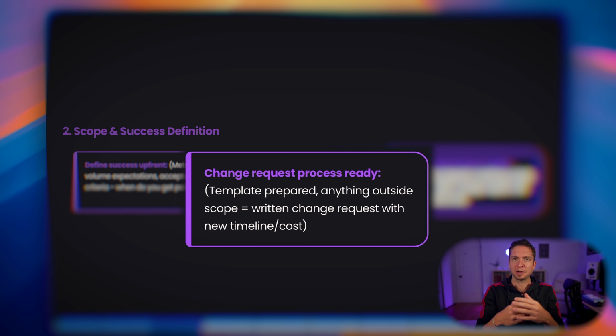And then finally, change request processing. So I always have a template ready in case somebody wants to have a change process implemented. A lot of the time when you have a very solid statement of work, every time a big change needs to come through, it's more money for you because you've set the expectation up front that any large changes are not part of this project, in which case it's a new piece. So it's very easy to have just a kind of proposal that you attach to your main statement of work that says these are the proposed changes. You get them to sign off based on a fee, timeline, all of that kind of stuff. You need to make sure that you're documenting this. You need to make sure that you have this ready to go because you don't want to delay the project by having to figure all of this stuff out.